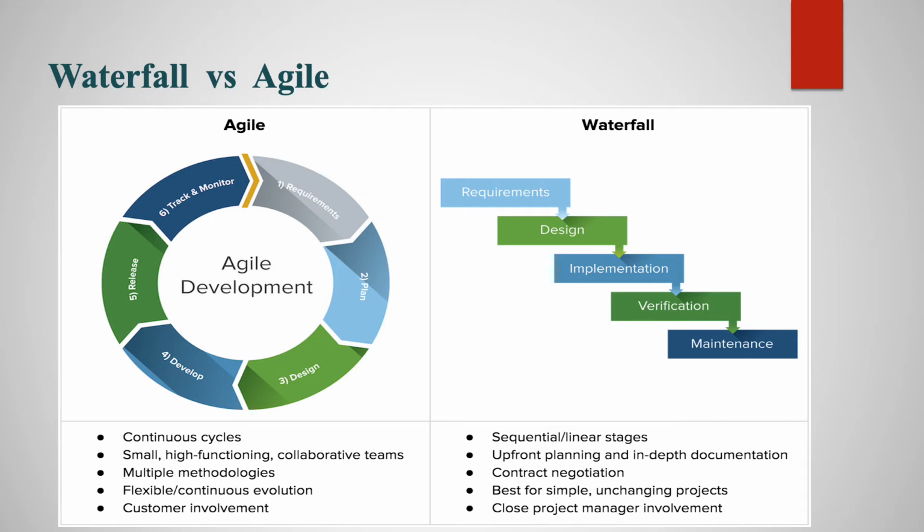The waterfall model is actually not good for larger projects, but at the same time, agile methodology is not a useful method for small development projects. With the waterfall method, if the requirement is not clear at the beginning, it is less effective. If you know very well exactly what the requirement is, then you had better go for the waterfall model.